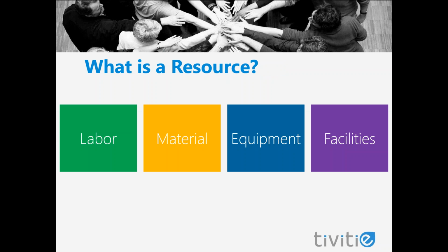I worked with a company for many years that built communication satellites. Every one of those satellites had to go through testing in some special test chambers. These were facility resources that the company managed in their schedules. In fact, when they first started working with project, resources like these and a few other large equipment items were the only resources they managed in their schedules because they were the main bottlenecks.